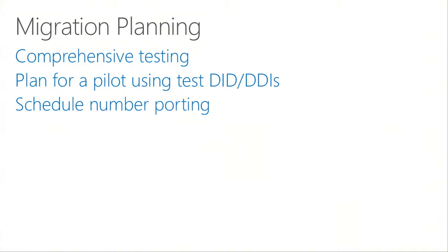And that's important in terms of scheduling the project, because if you get halfway through a project and then you say, oh, I need to move 10,000 numbers, and you work out it's going to take 3 months to do that, that's going to blow your project timeline out like nothing else.